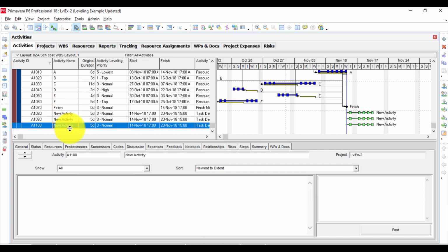Now you delete the activity and you delete the comment inside the activity. Now imagine this is a baseline, or imagine this is an updated project and you are doing this post. Now again, you have this activity. Let's do a bad word and post it. You can't delete the activity. It's part of the project. You are making a comment about an existing approved activity. Okay? If you delete this activity, you might delete the updates. You might, you will delete the links. You will mess up everything.